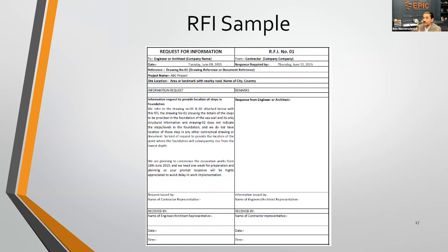RFIs may also be utilized as an initial conversation starter to a change order, for example. If it was a material selection item where architectural plans show gold leaf and interior design plans show regular wallpaper, the contractor may have only accounted for the wallpaper and not the gold leaf scenario.